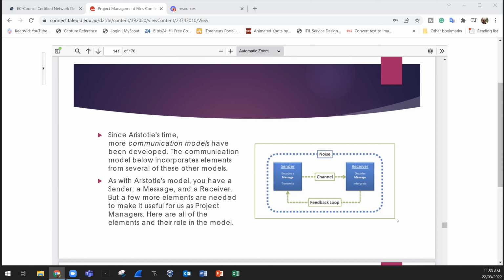So in this plan, for example, we say, okay, the team members will send a weekly report of their tasks to the project manager. The project manager will send a weekly report of the finished work to the key stakeholders, or remaining work, or cost and expenditure.